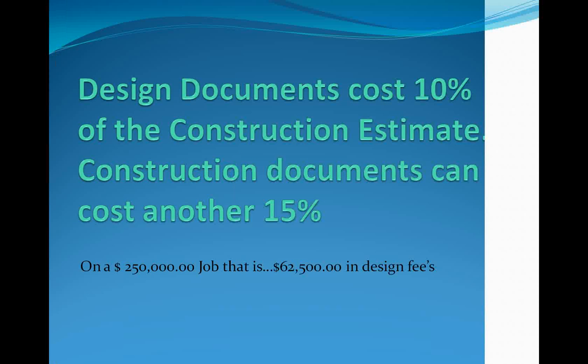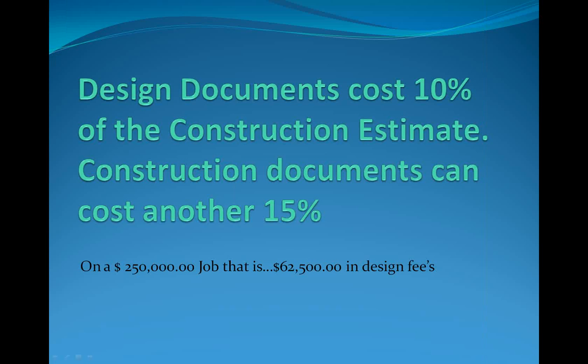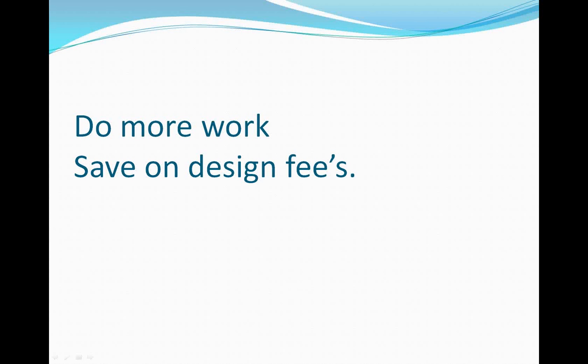Design documents cost 10% of the construction estimate. That's just to get the drawings into the bid phase of the project. Construction documents can cost under 15%. On a $250,000 job, that's $62,500 in design fees. That is on one job.